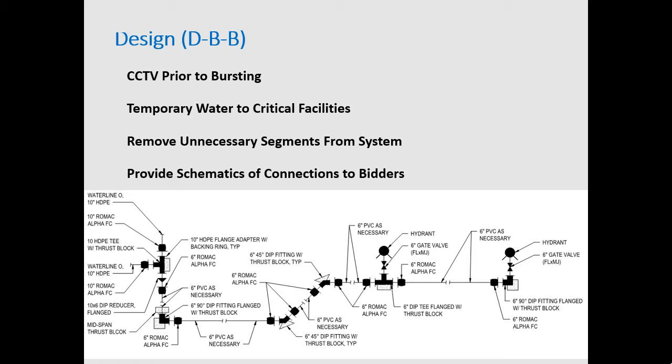You may decide, Mr. Contractor, to cut this out and go from here to here, depending on the site. But at least it gives him a bill of materials that he can order and bid against other contractors with. And so we did this with the design build project. That contractor hadn't really seen that before in the fee negotiation. It was kind of, do you really need to do that?